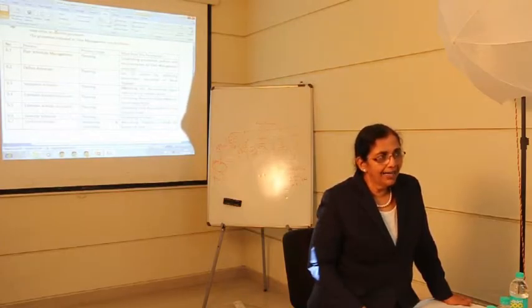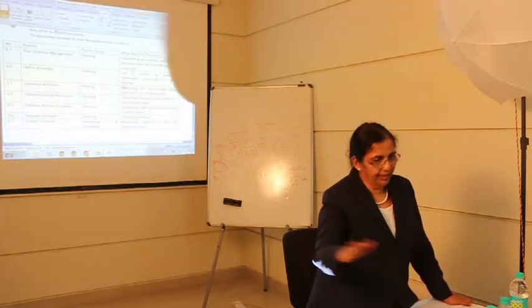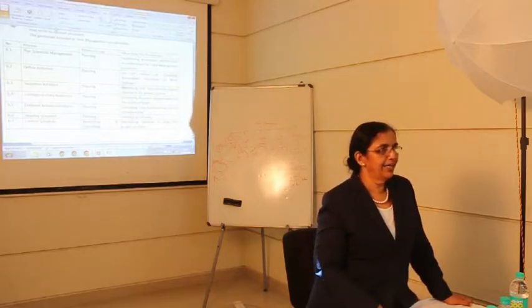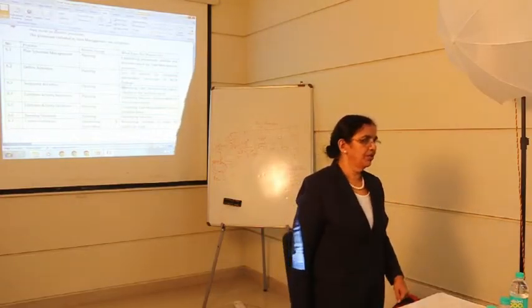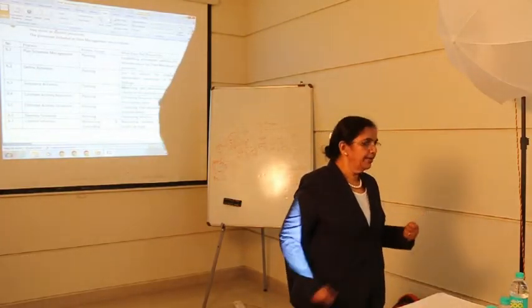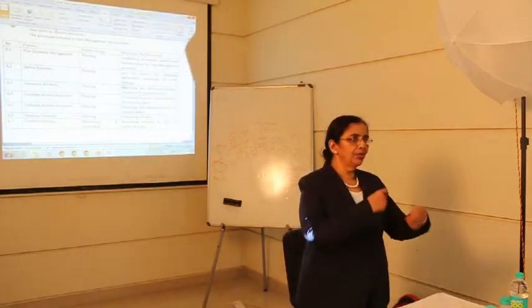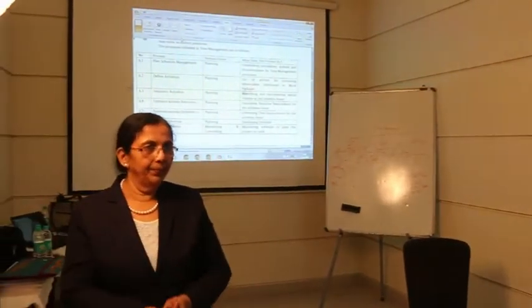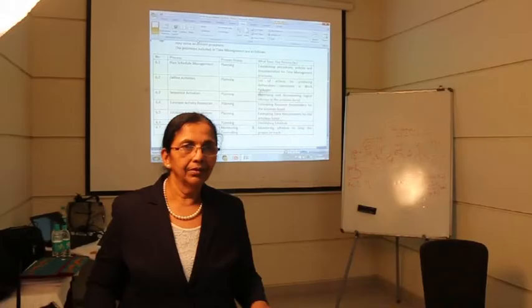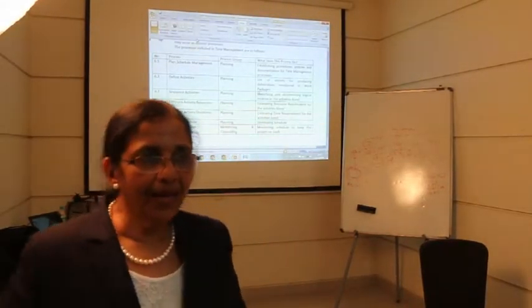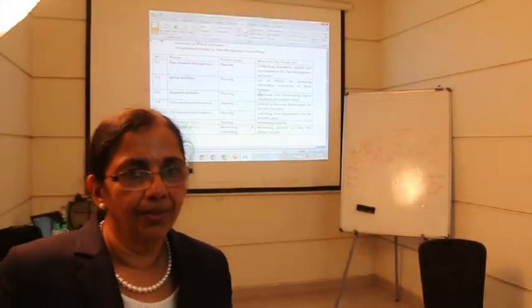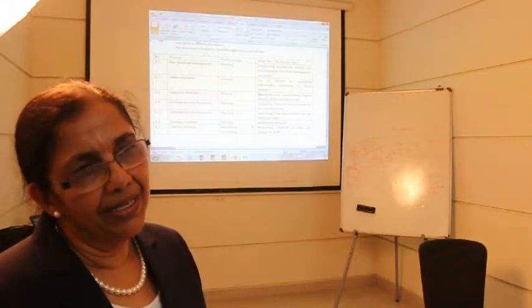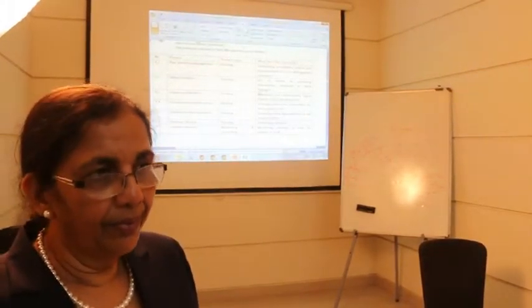So once you have activities to complete all the deliverables, you have defined activities. So let us say there are 100 activities, 1 to 100 on a particular project. Can you simply start doing 1, then 2, and then 3, go to 100? No. Usually you will try and do most of them parallelly so that you can finish things faster. But can you do all the activities parallelly? No, there are by default, by nature there are some constraints, some issues, some problems. So you need to do certain activities in certain sequence only.